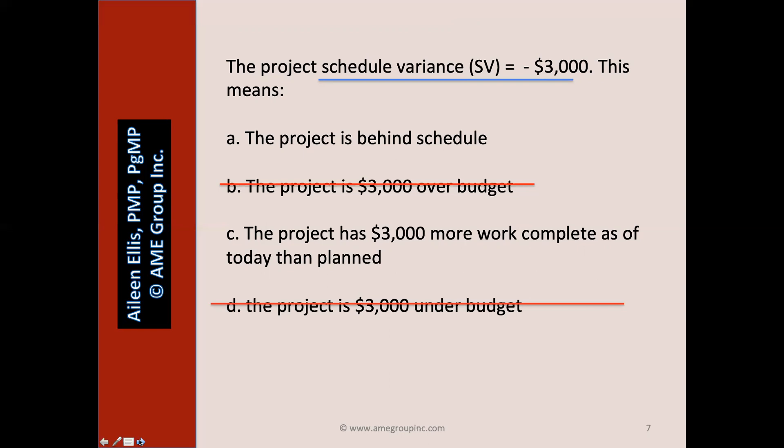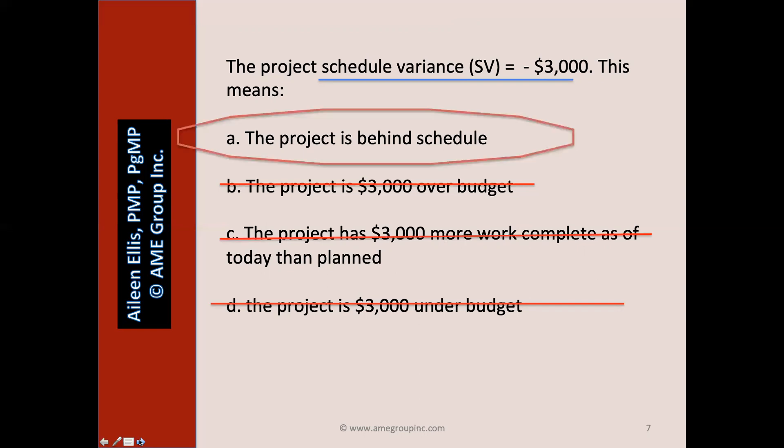So now we're left with A and C. The schedule variance is a negative number — that's bad; it means we're behind schedule. So A is the right answer. Answer C, 'the project has $3,000 more work complete as of today than planned,' is wrong — C describes a situation where we would be ahead of schedule, meaning our schedule variance would be a positive $3,000.